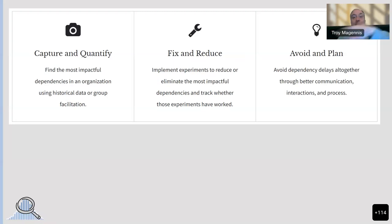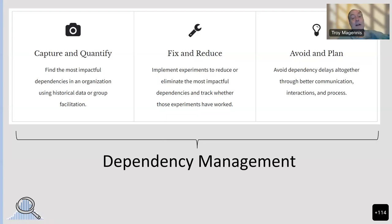There's always going to be a reason why some skills — either because of economy of scale or sensitivity to privacy and reliability — you might want to compartmentalize somewhere. The three capabilities you need to grow in your organization around dependencies are: first, the ability to capture and quantify your dependencies; second, find ways to reduce the impact of those you currently have; and third, alter your process to avoid common dependencies and plan around them. Until you can do these three jobs, you're not really handling dependencies in any coherent way. I'll give you a hint on each during our time together.